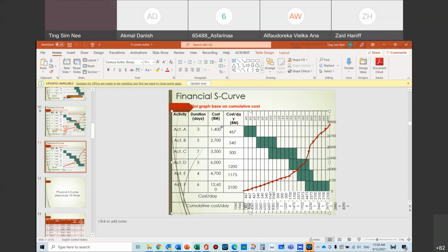So AC, you punch it in, then you look at the work that was done on site, then you take that and calculate back with your original budget, as in your original expenses that you plan to have. Straight away, you can tell yourself that your work is okay or not okay. Are you over budget or are you under budget? Okay, straight away you can tell already.